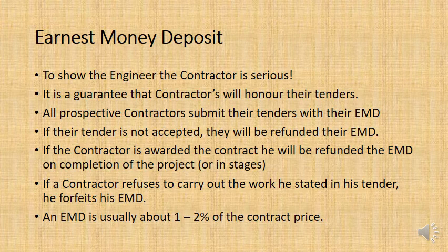Because if the engineer awards you the tender as the contractor, and then you go, nah. Well, first off, you've broken the law, because when you submit your tender, that is a legally binding contract. That means that you've already accepted to do the work, and all that you're waiting for is for the engineer to accept your tender.